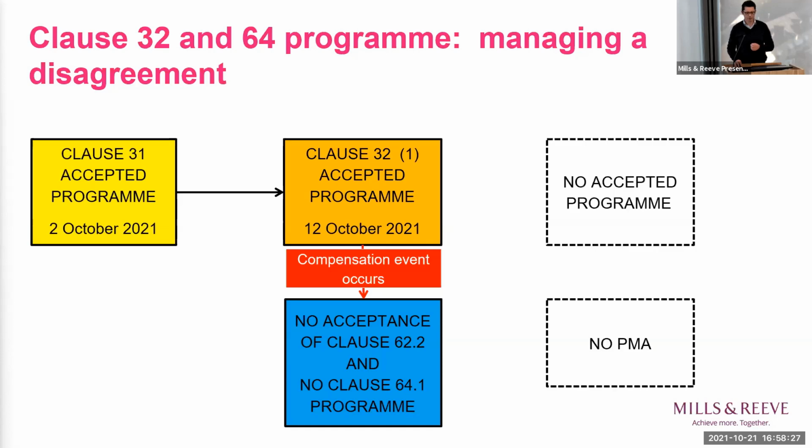The other issue to be aware of is that if the PM disagrees with the contractor's assessment, it should step in and issue its own PM assessment. If you don't have a PMA, if you don't have an accepted programme, you are unlikely to be able to successfully manage an NEC project.